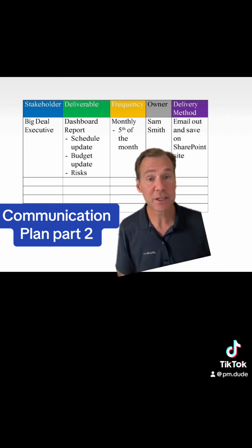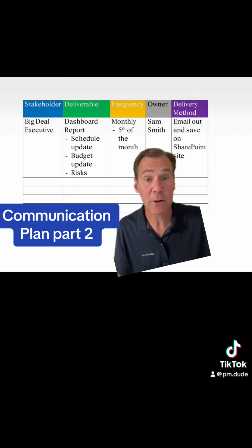And then last part, we have delivery method. In this case, I'm going to email it out on a monthly basis, but I'm also going to save it on that SharePoint site. It could be I save it on the SharePoint site and send out the link, whatever that is. The idea of this is then you can go sit down with that big stakeholder and say, this is what I'm planning on giving to you. This is when it's going to come to you. And this is the type of information. Are you okay with that? And you can have the negotiations then of what that looks like.